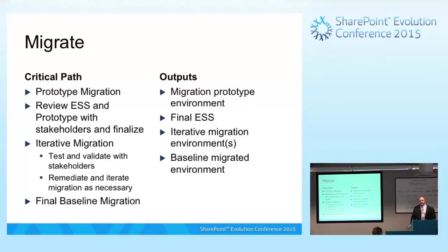Right. So there's a variance, and the RTM really should be done by then. But like everything, there is flexibility. The goal is to have a predictable outcome. So if there's something that's learned in here that requires an update to the RTM, can you update the RTM? Absolutely, you should update the RTM. Just be careful. We don't want this scope to go on infinitely.